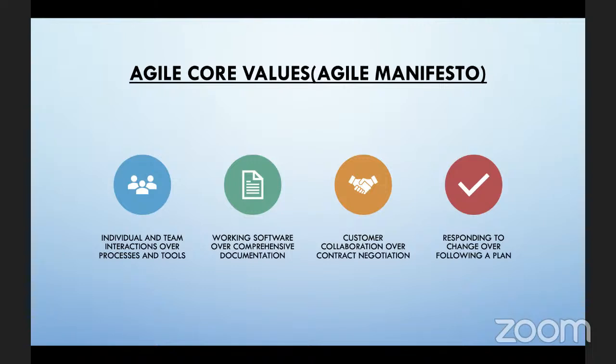So we're also going to work with our schedule and make sure that we're able to deliver on time for you, etc. So contract negotiation is more important in waterfall. There's a lot of emphasis on that, and if the stakeholder comes in the next day during the solicitation process and says, oh, I want this feature change, they'll be adding more hours, right? The team will be adding more. Oh, then it's going to cost you more money. It's going to cost you this.